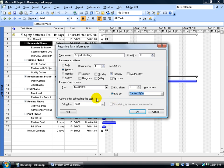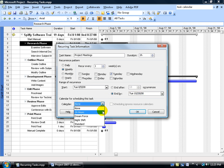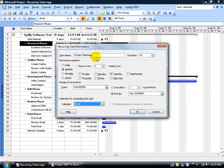Something interesting is that the dialog asks what kind of calendar you want to assign to this task. By default it's set to None, which means this task follows the project calendar — so if meetings fall over Christmas week and we have that off, it'll bump them out. However, if you create a separate project meeting calendar with different working hours, and assign it here, it takes precedence over the project calendar for this one task — overriding the project calendar's working times and days off.